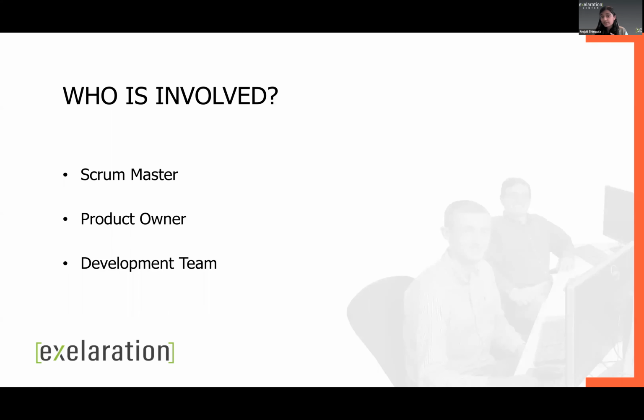And the product owner is the person who is ultimately responsible for the outgoing product. So I'll give you the example of, I work in the consulting world. For us, oftentimes our product owner can actually come from our clients. Our clients who come to us and say, hey, I want this app developed, can have somebody identified on their team to be our product owner and say, this is what we're looking for. These are the components we would like. And additionally, at the end of the day, make sure those are the components that they got.